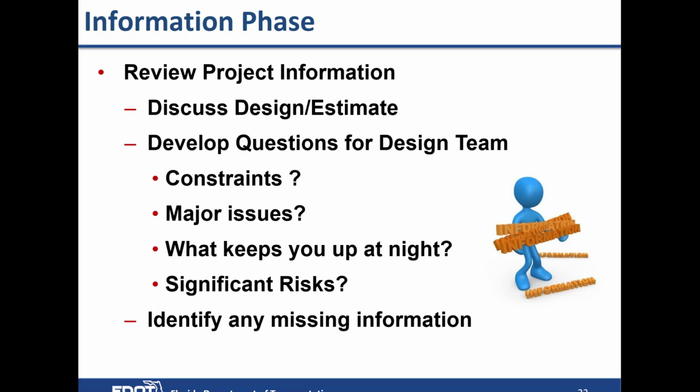And then again, they're going to identify any missing information and ask the design team for that information. Then we'll have the team briefing, which is by the design team. They'll come in, they'll do a presentation, they'll explain it. It's an open forum. Everybody asks questions at any time.